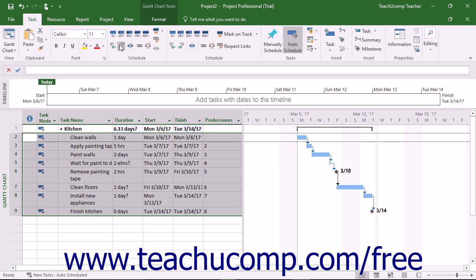Note that the duration of the phase or summary task is the total duration of its related subtasks.